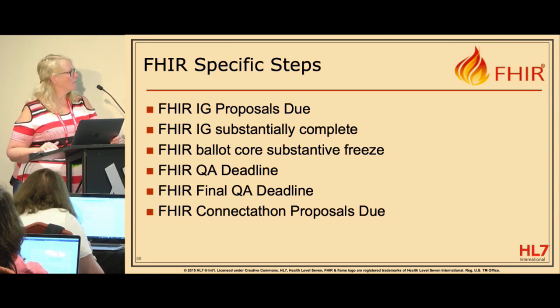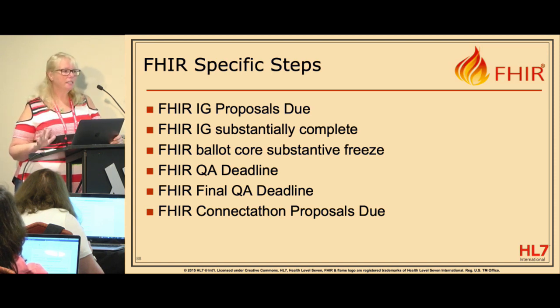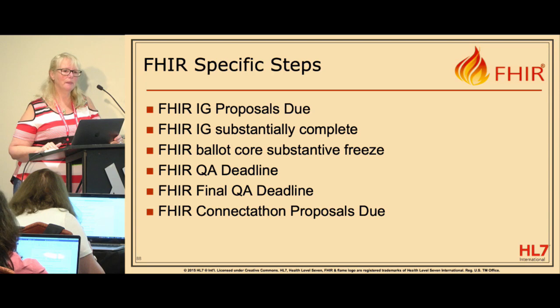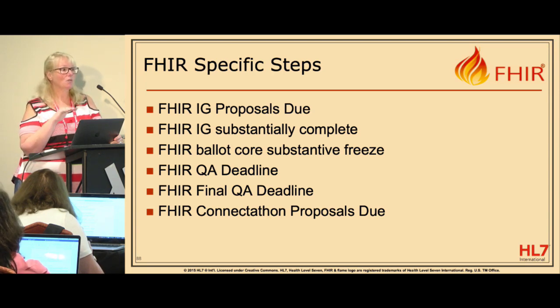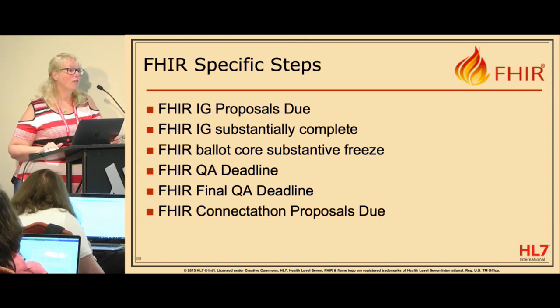There is a FHIR core substantive freeze date. There is a QA deadline that is roughly 2 weeks before the ballot opens. It's probably a little bit more than 2 weeks before the ballot opens, but that's the date that your IG is expected to be complete, ready to go, handed off to the work group, the sponsoring work group, for their approval, because that step has to be done before you can go to ballot.